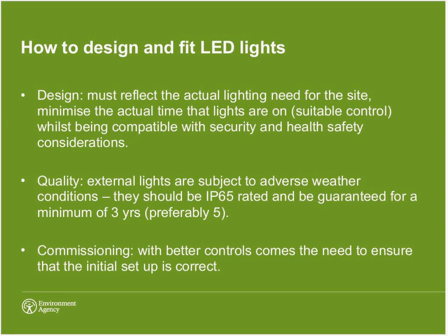We looked for things that were IP65 rated, so they had high protection against the ingress of water and dust, as they're outside in extreme conditions. We've gone for fittings that were guaranteed for 5 years. Actually, I've put a minimum of 3 on here, but we went for 5. We want some guarantees that the lights did what they should. I think that was always a bit of a jump into LEDs: will they do what they say they will in terms of longevity?